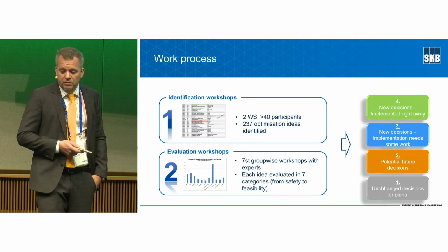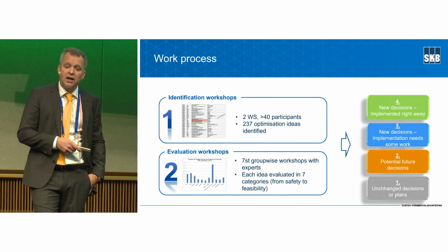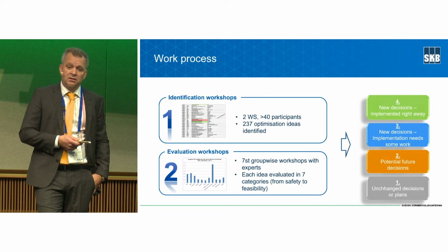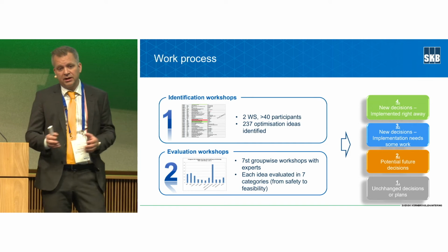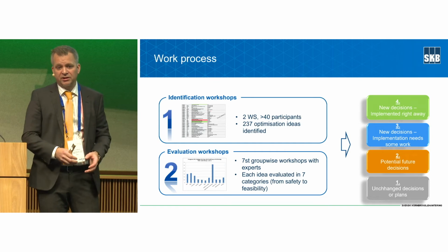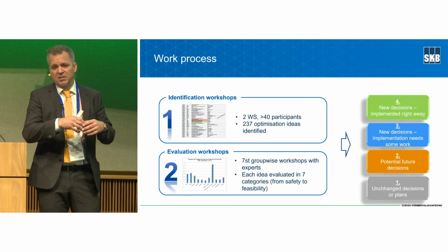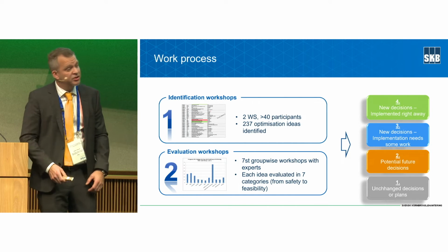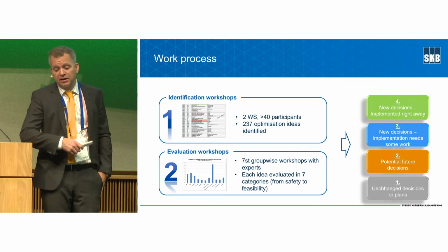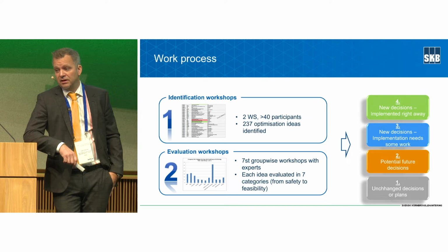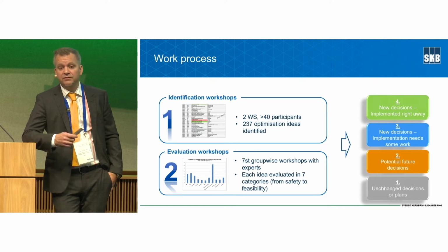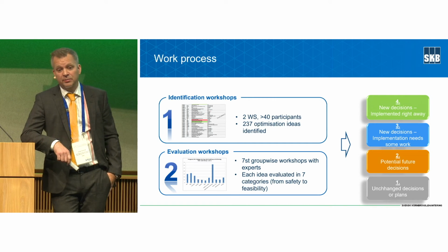But we also needed to evaluate all of those ideas. So we gathered expert teams. We sorted all of these 230 ideas into different groups: construction, rock excavation, maybe bentonite and clay production, and gathered experts in those areas so that they could evaluate all of these ideas in their box out of 7 different categories. Everything from safety to how feasible it was, to how much work we would need to put into it to actually make it happen.